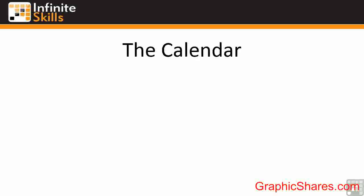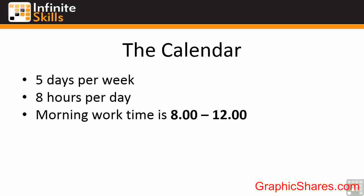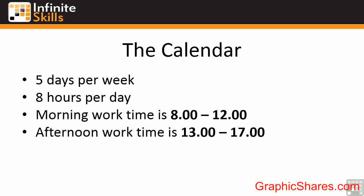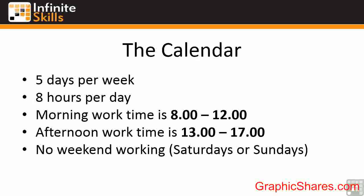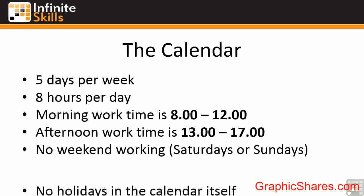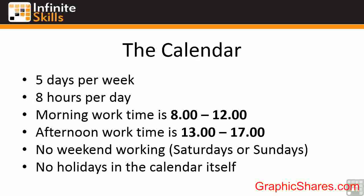The calendar in Microsoft Project 2013 has a number of prebuilt defaults. The main one is that everybody on your project works five days a week, Monday to Friday, eight hours per day — morning from eight to twelve, an hour's lunch, then one to five. These are the predefined defaults but they are changeable through the software. No weekend working is included in the calendar, though we can add that. None of the bank holidays are included either, and that's an important item to remember to add — all the public holidays that could make a difference to how long your project will take.